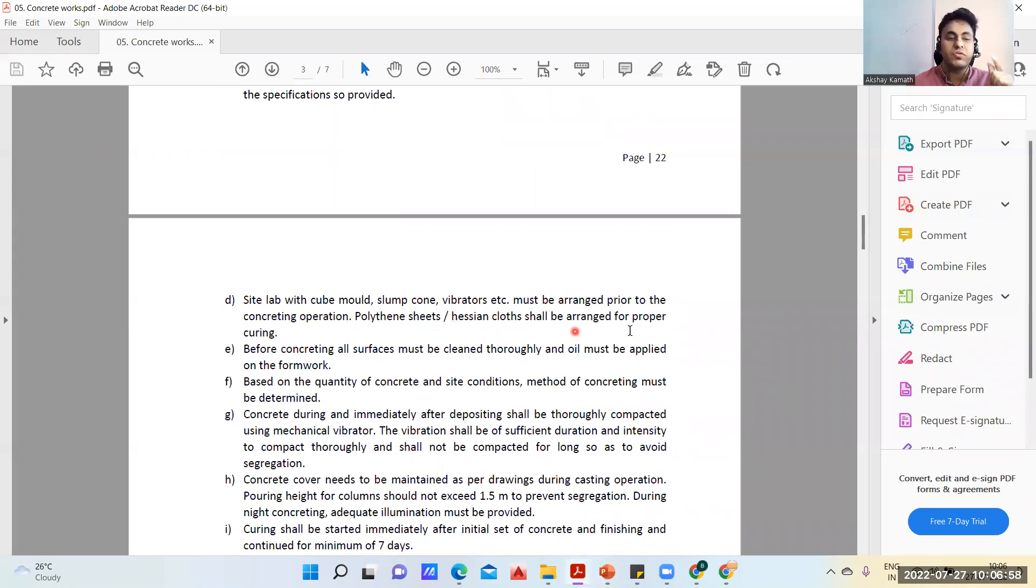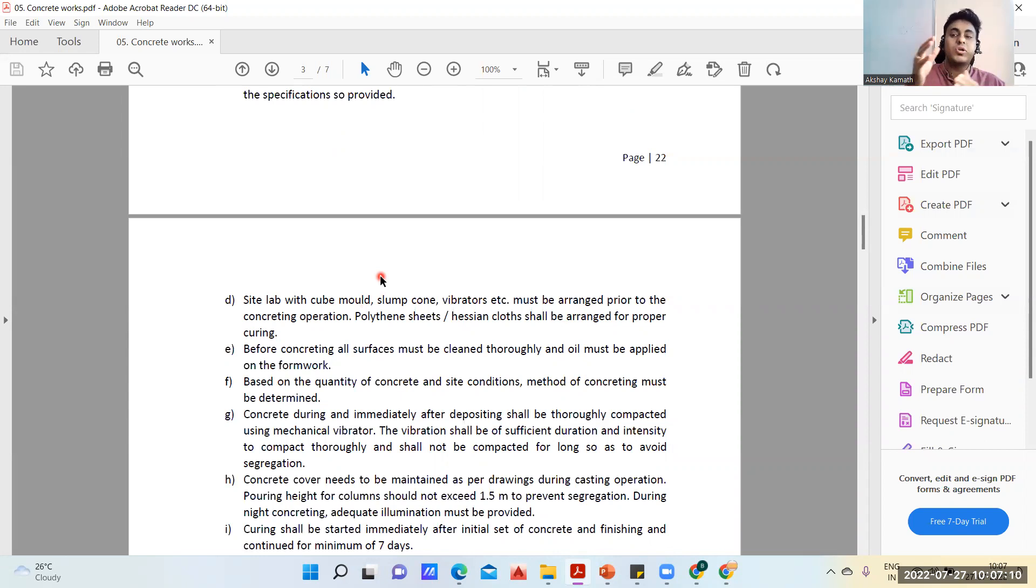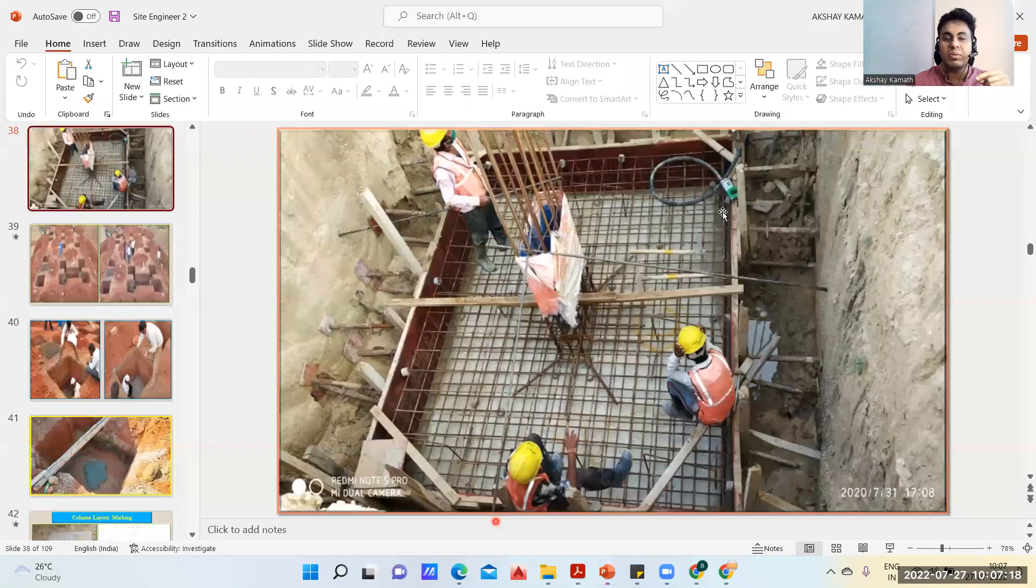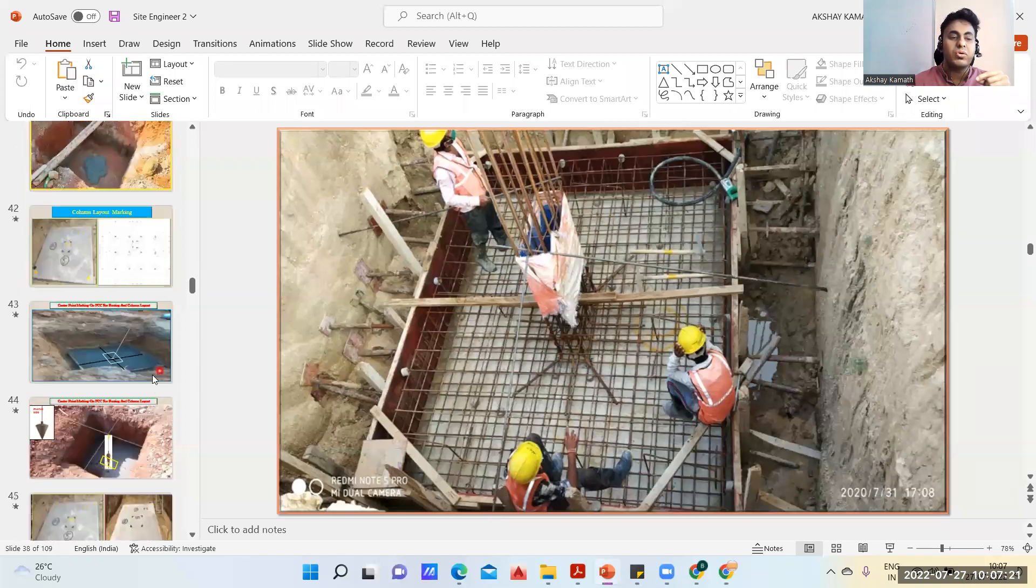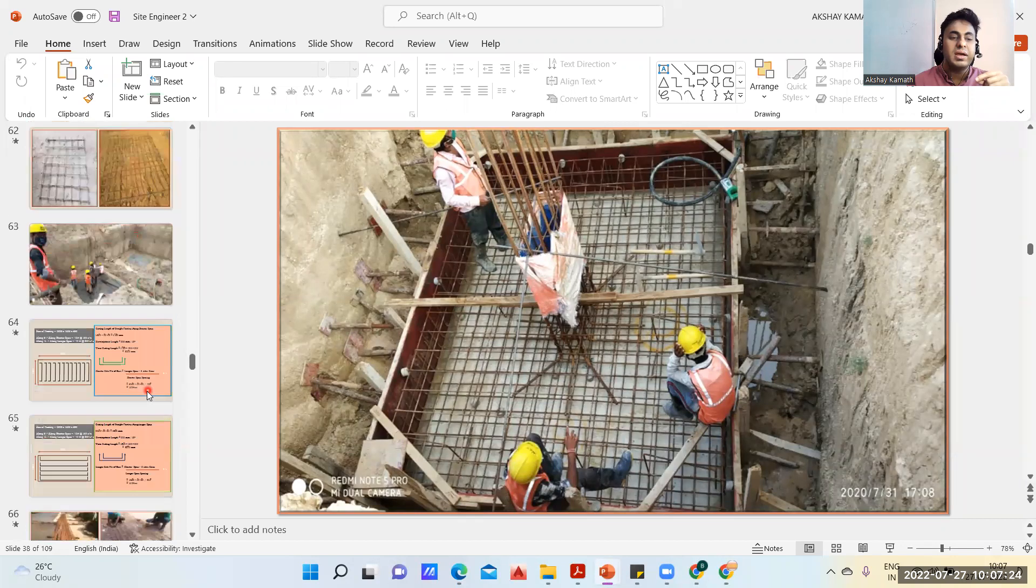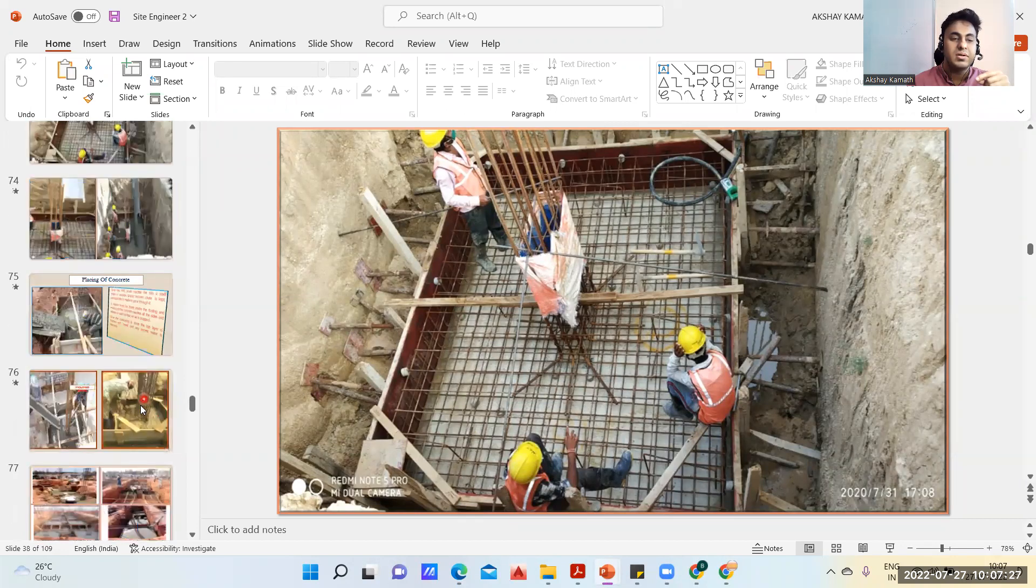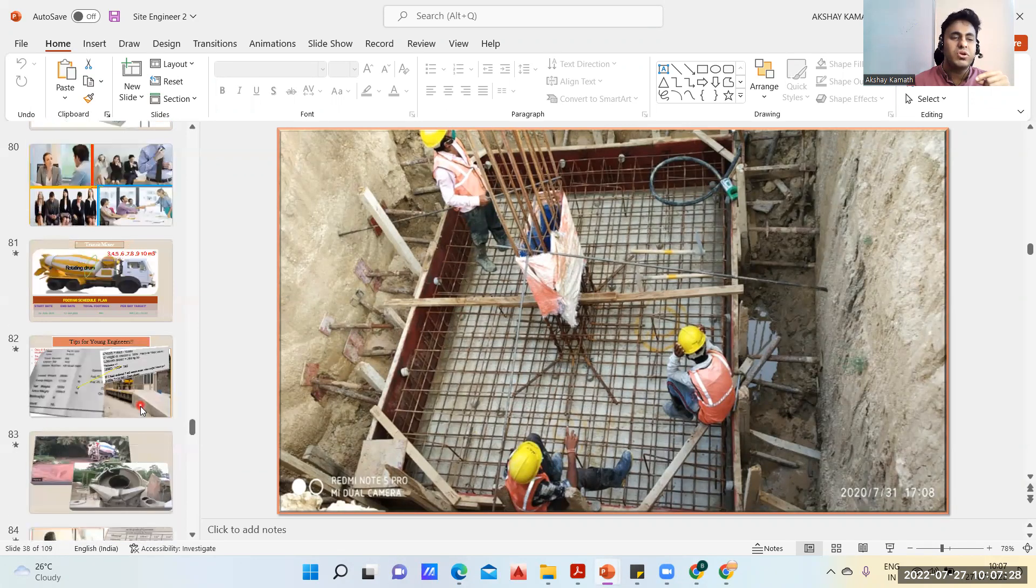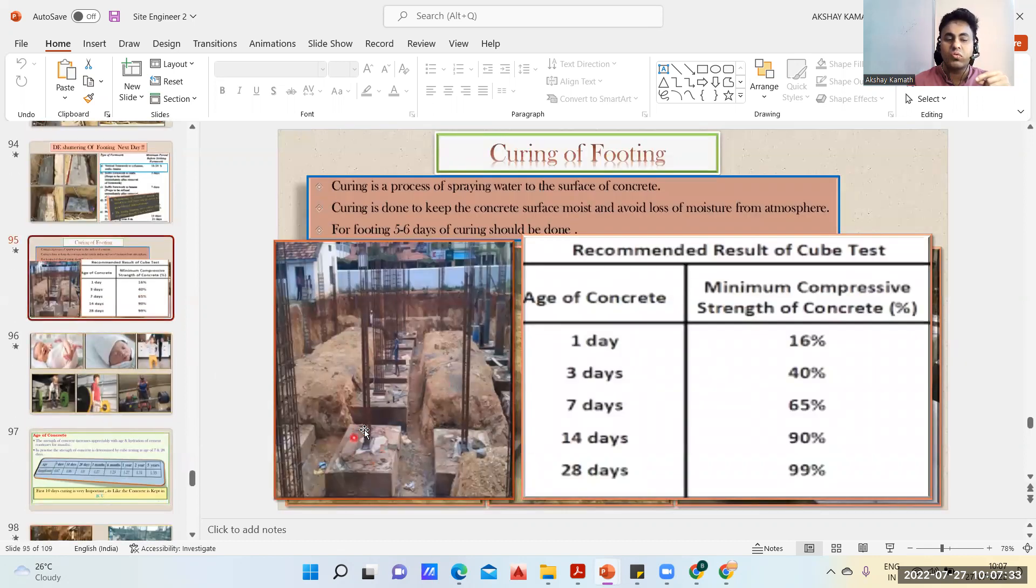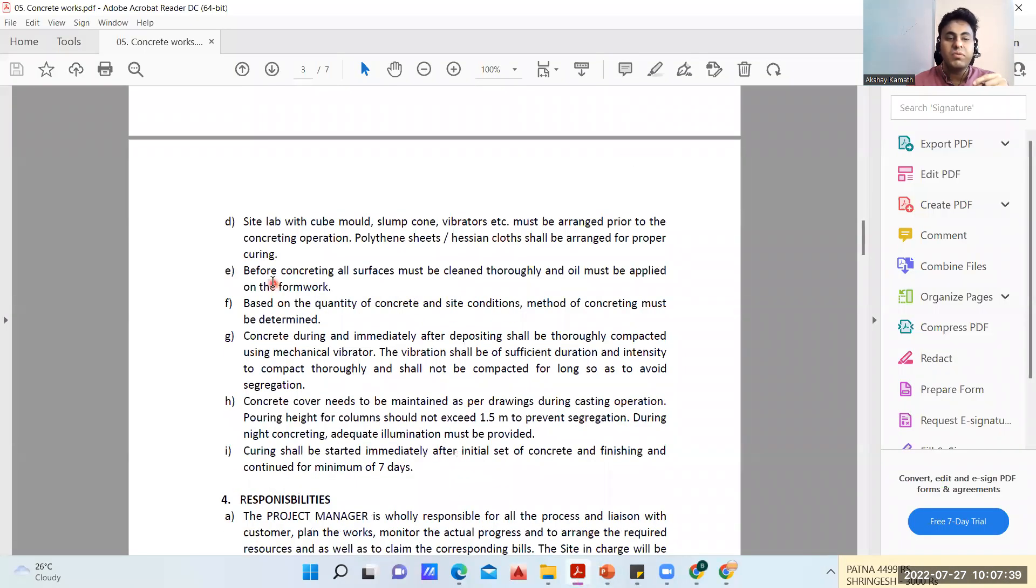Site lab with cube mold, slump cone, vibrator, etc must be arranged prior to the concreting operation. Polythene sheets or hessian cloth shall be arranged for proper curing. Before concreting, all surfaces must be cleaned thoroughly and oil must be applied on all the shuttering or formwork. Based on the quantity of concrete and site conditions, the method of concrete must be determined - whether you're going to bring in the long shoot, or pour it, or directly through RMC truck.